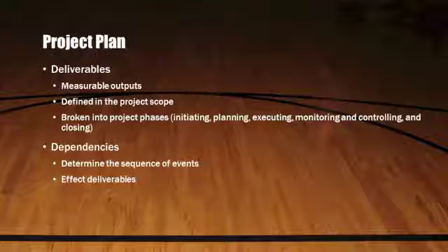Each phase includes deliverables and tasks which are defined by duration, start date, finish date, predecessors, and resources named. The dependencies help to determine the sequence of events in the project. Each work package and subsequent tasks are assigned predecessors to determine when each task will be done in relation to the rest of the project. These are shown in the following timeline.